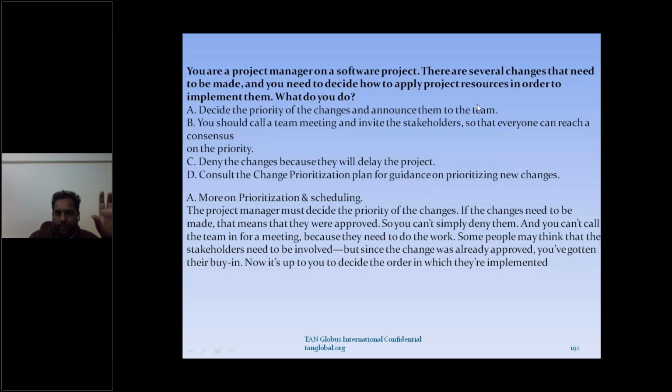Again, this question is saying that several changes need to be made. Generally, the changes are approved and they are lying there. When you prioritize them, sometimes the product owner or the sponsor tells you the priority, but you also tell them when you can take it. As a project manager, it's your call also when you can take it. So prioritization depends upon both people. Sometimes you may say, I will not be able to take it. That means the planning part is with the project manager, and deciding whether it is to be taken or not is with the CCB. Manoj, hopefully I'm able to clear this question.